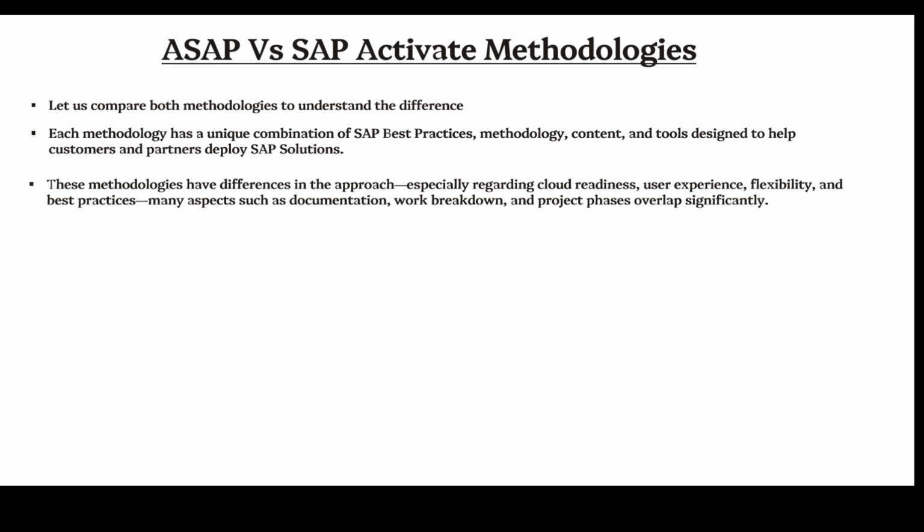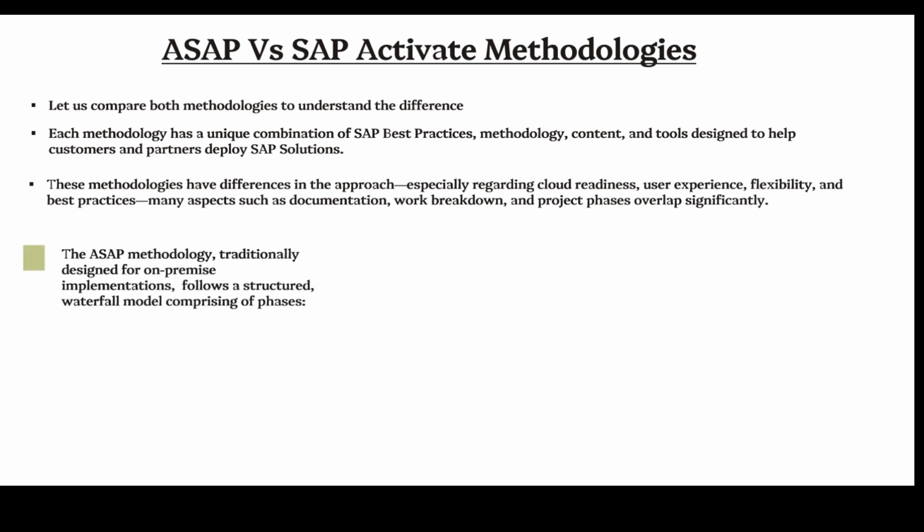Many aspects such as documentation, work breakdown, and project phases overlap significantly. The ASAP methodology, traditionally designed for on-premise implementations, follows a structured waterfall model comprising phases: project preparation phase, business blueprint phase, realization phase, final preparation phase, go-live, and support phase.